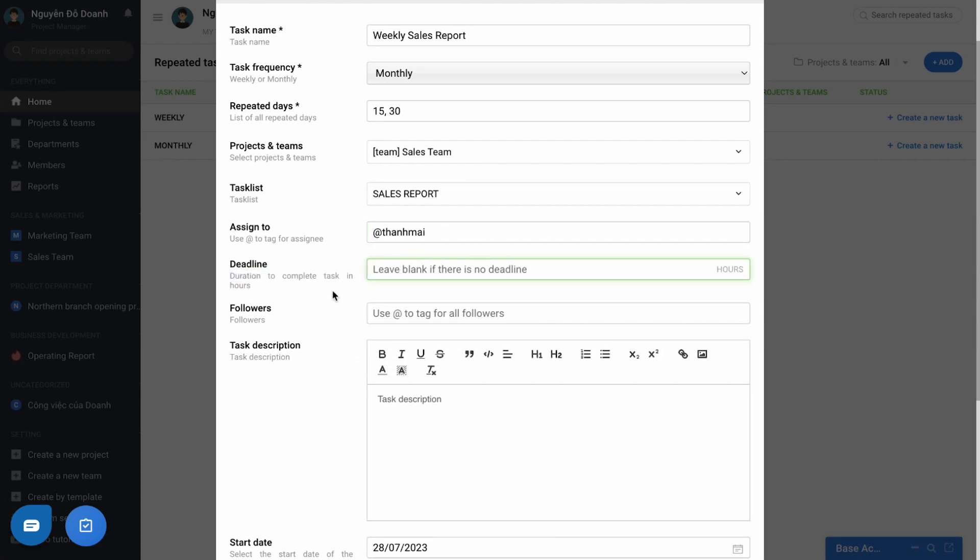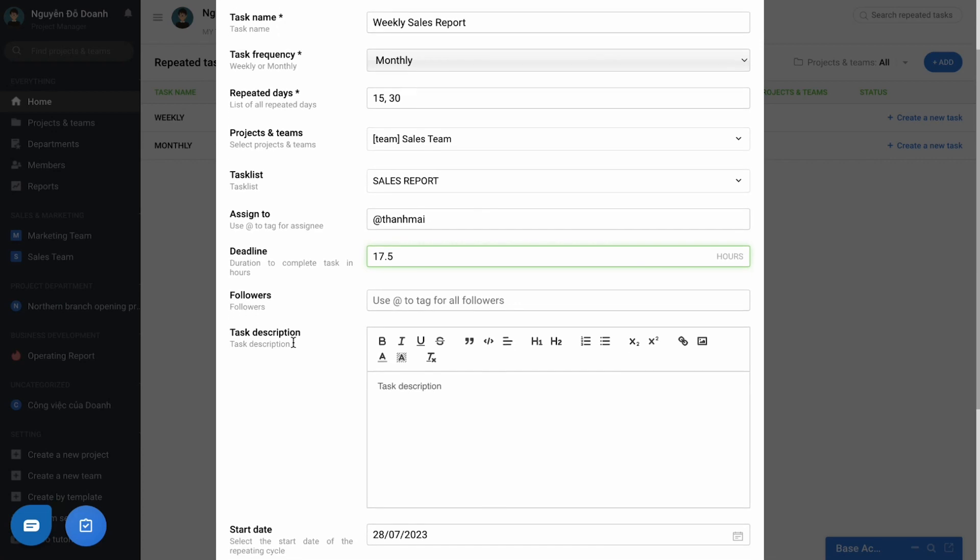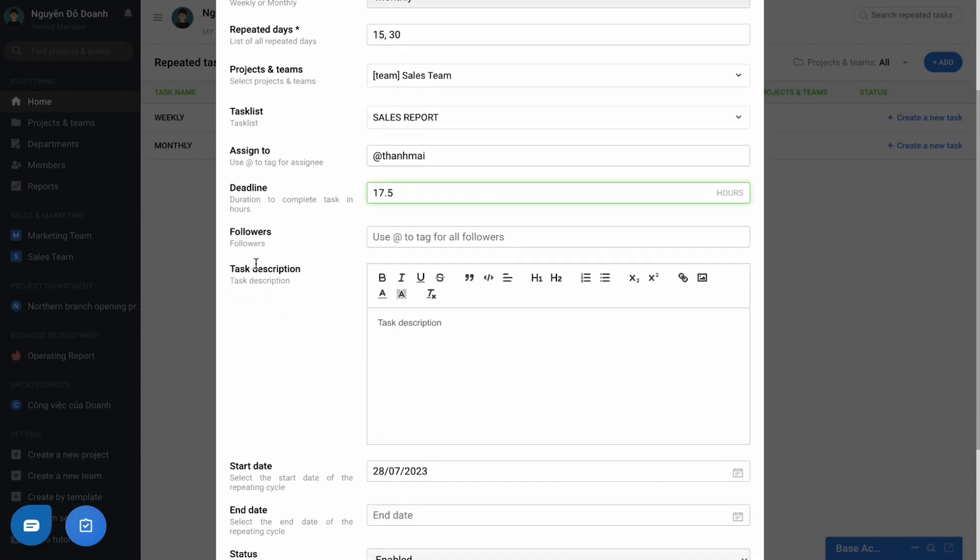For example, the work that needs to be completed at 11 am of the day, you can fill in 11. Or need to be complete at 5:30 pm, you fill in 17.5. You can add the follower or add the task description if any here.